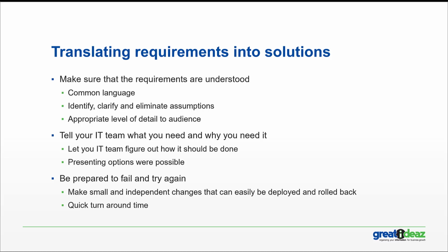Right? So when we come up with our small set of requirements, we can say, well, we need to implement these 10 things. Go away and implement them. And the IT team comes back and 7 out of 10 are good, and 2, not so good. Can you have another try at this, please? And then they can focus on those 2 plus another 8 things in the next iteration, in the next cycle of doing work. That's much more likely to lead to the business actually getting what they need and getting that need into implementation and production faster.